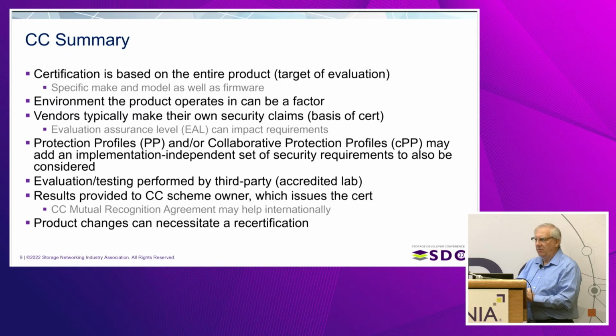for a moderately complex product, you could reasonably expect to spend $250,000 on it. And if you have to go through a revision of that, that could be anywhere from $90,000 to another $250,000. And it can take you anywhere from 3 months to 2 years to run this gauntlet. So it's definitely a paper tiger that will consume resources. So you want to be very strategic about how and when you engage these things.